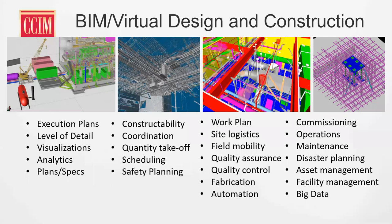In the past, whoever got there first wins when installing mechanical systems — which creates a lot of headaches. Now we can actually schedule out and have people come in in more coordinated phases, making for a better installation of every system in the building. Quality goes up, coordination between different systems is much higher. Quantity takeoff is much more accurate because you're pulling from exactly what's needed from the model — down to the exact number of elbows and T's in the plumbing system, the exact embeds in the concrete. This gives a super high level of detail and accurate quantity takeoff, which means a super high level of detail in scheduling and planning.